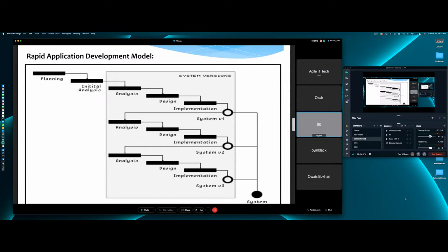Team three. What are they building? Interior exterior. When are they starting? January. And when are they delivering? End of June. So when do I get all components on my vehicle now? End of June, in 6 months. Compared to what in the traditional team? 18 months. So, why is it called rapid? One third of the time.